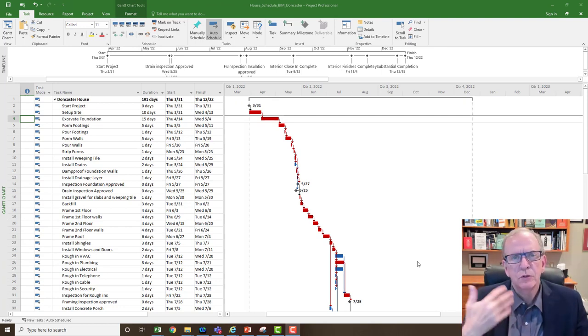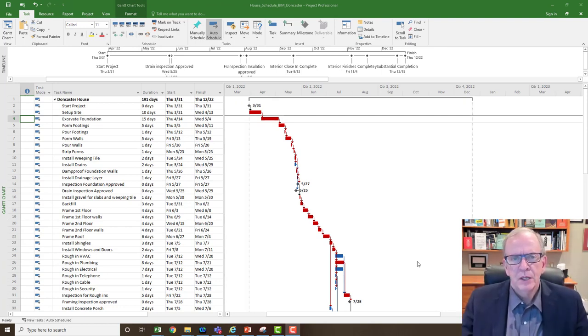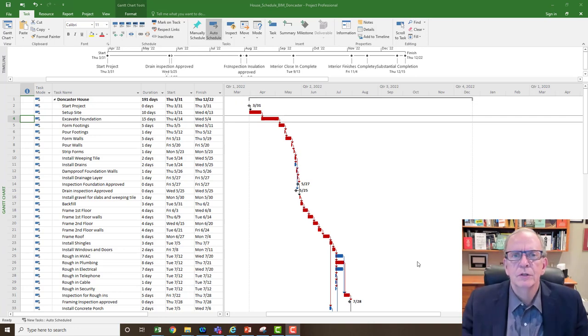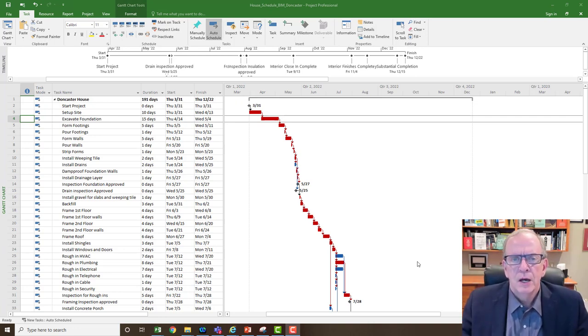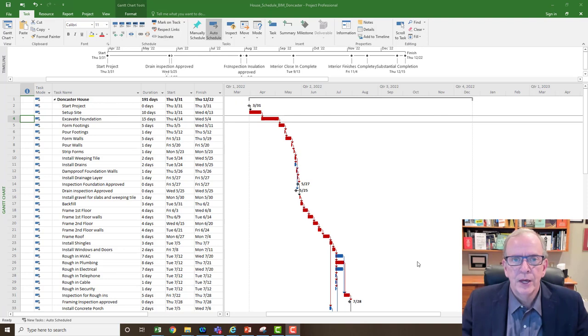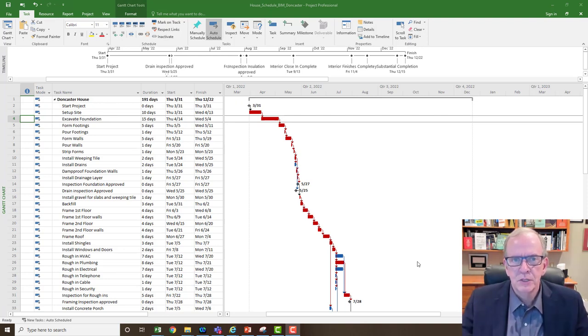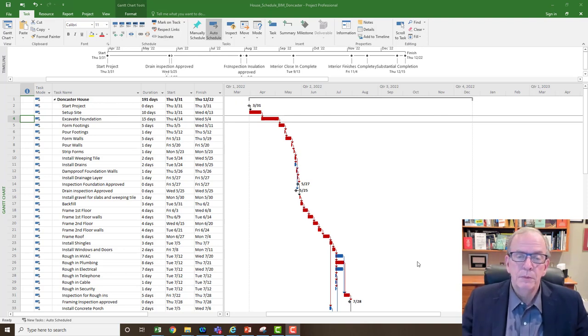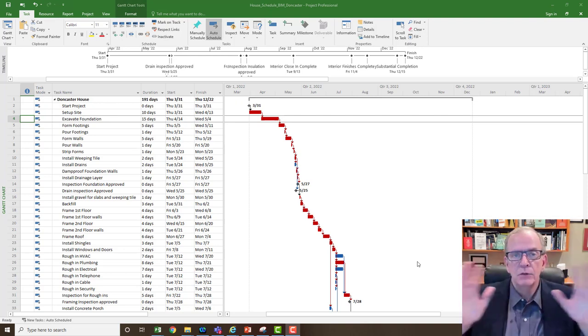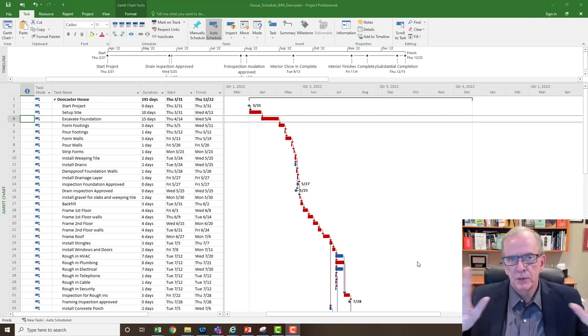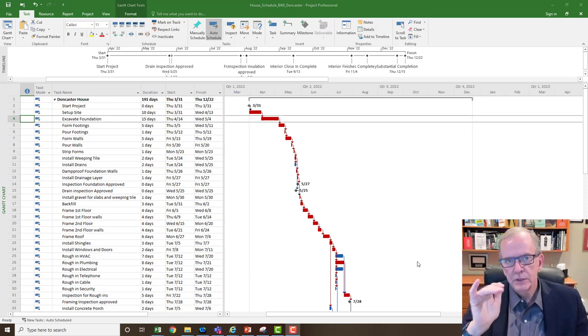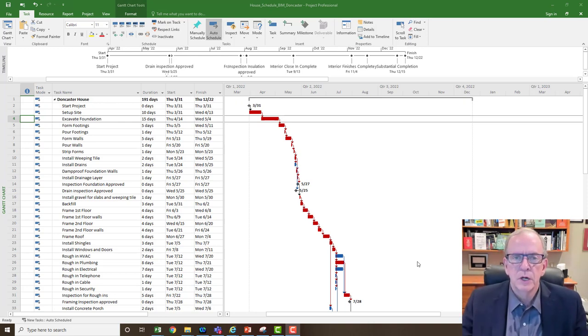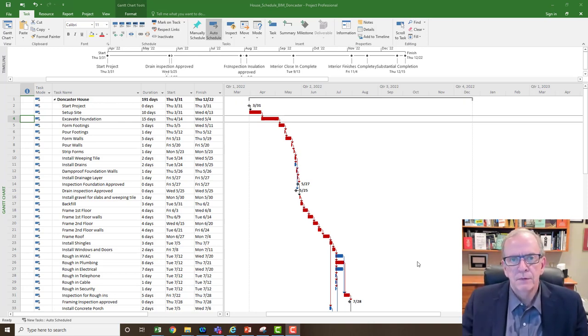Especially when you're doing updates later on, you can have photos and insert links to those photos with the actual activity. So it can be really helpful that way to tell a story, especially when you're trying to explain something to a sub-trade or to a client. Or maybe you want to print out something that you want to put up on the wall and say this is what we're targeting at a specific point in time.